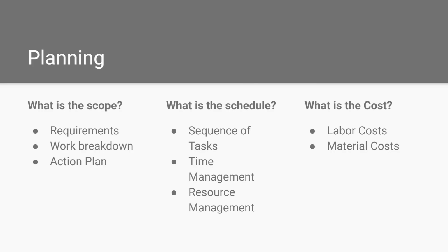So the difference between a to-do list and an action plan is basically that some tasks cannot be done before other tasks are completed. So the main idea is that you know exactly which tasks are going to block other tasks, and then you can structure it out. And that's very important for the next step, because what's then your scheduling?